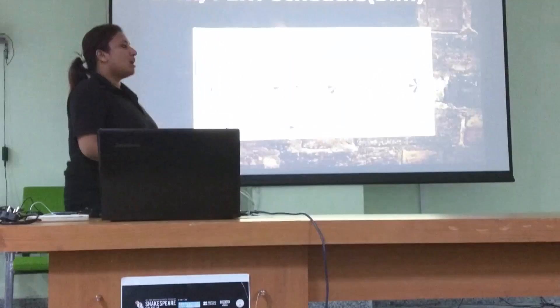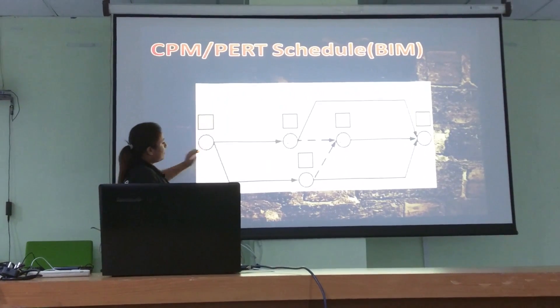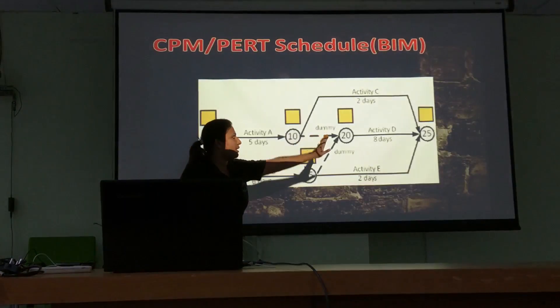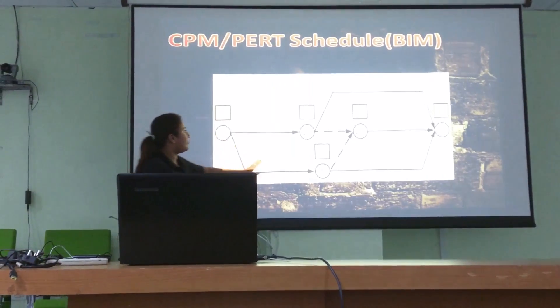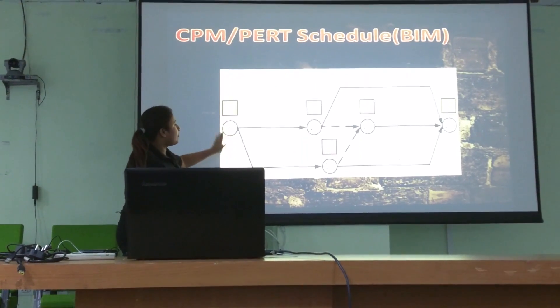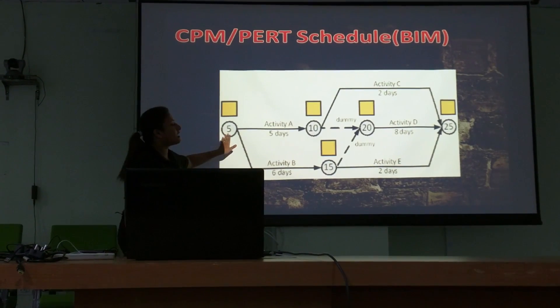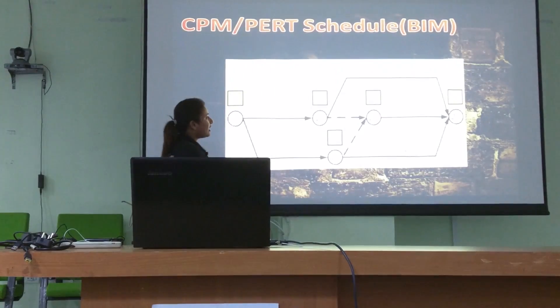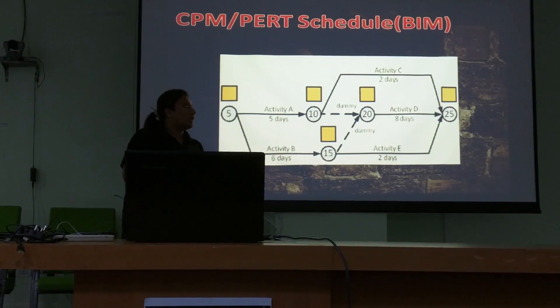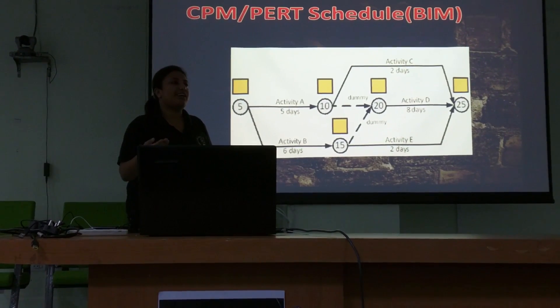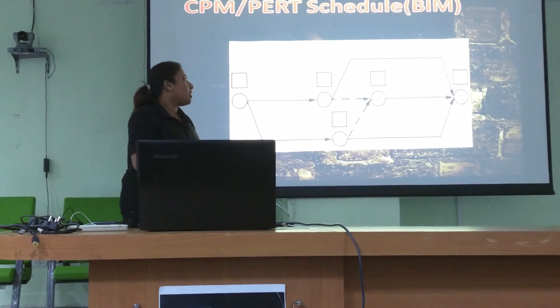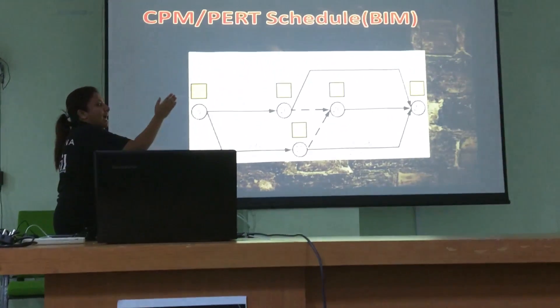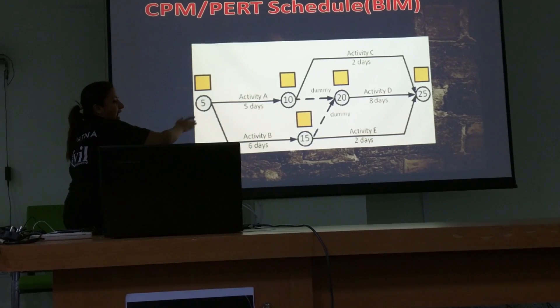The next is the input we are going to provide. There are two things used for scheduling: PERT and CPM. PERT is the more probabilistic approach and CPM does not take care of probabilities. These numbers can be assumed as events: 5, 15, 10, 20, 25 are the events. For jumping from event 5 to event 10, I have to do some work — this is called an activity — and the activity will take some days, mentioned below the activity. There is also the concept of a dummy activity. A dummy activity is very useful during scheduling because you need a column before setting up a beam, you need a foundation before setting up a building. This dummy activity says you have to complete activity 20 before activity 10, and the time period for a dummy activity is assumed to be 0.